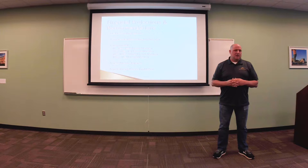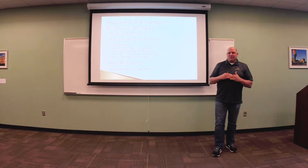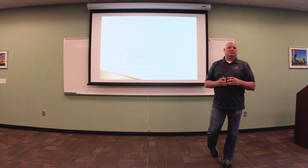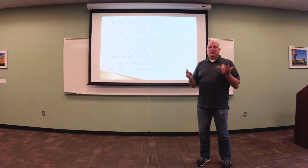I don't recommend you try to play with the numbers too much. You definitely want to have the money you need when you need it. You don't ever want to go to zero. You probably don't ever want to go really below 20%. That way you have that buffer when you have those huge projects. Say you do a huge roofing project and they bid to replace the roof, and they tell you the sheeting will be $50 a sheet if we have to replace bad sheeting. What if every single piece of sheeting on every single roof has to be done? That's not part of the bid, that's extra. So what if the bid goes over 20%, but you only gave yourself a 5% buffer? That's why we like to have some buffer in there.